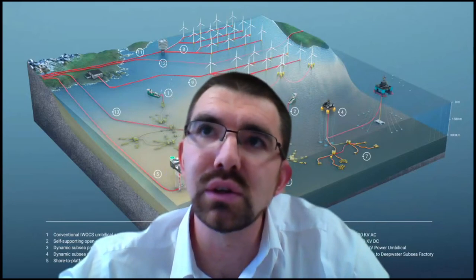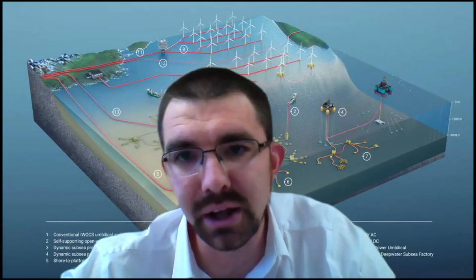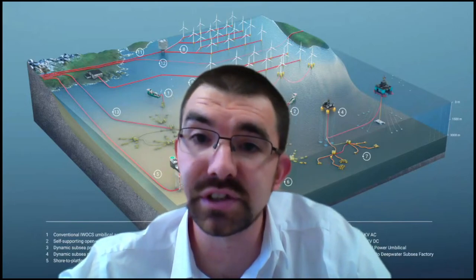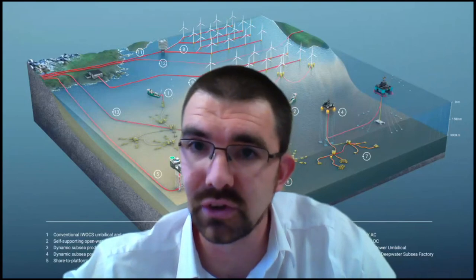With the logistics side, you not only need to consider who you're having in your team, but also how you're going to execute the plan offshore. For example, just to get offshore alone, you need marine coordination, you need port services, you need vessels, you need CTV access, you need access to helicopters.